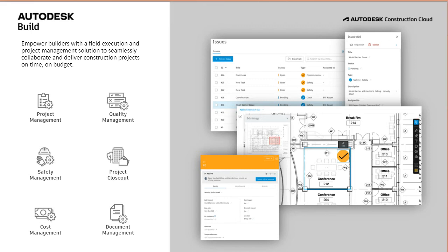And then cost management has a change management component that ties RFIs back to any cost implications. So if there's a necessary design change and we need approval from the architect or engineer or the owners, it can be tracked and ultimately affect the budget. Cost management is probably not from a specific user perspective for this group of architects and engineers, but being involved in that change management process could be important for you all.